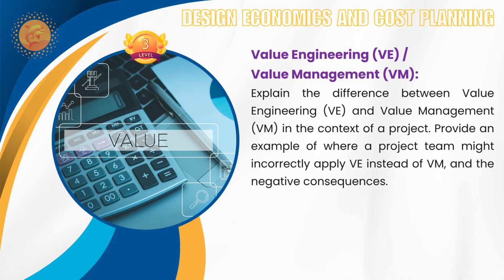Okay, so that's the area I was confused about. Consider when you have some sort of provisional sum. You have some budget, and that budget is going to have something similar to a cost plan. So the further design development will be like value management. Although you are not doing any value engineering exercise for a provisional sum scope, it is similar to that. Again you have some sort of value management to maintain the cost control within the target. Okay, is it clear? Yeah, thank you.